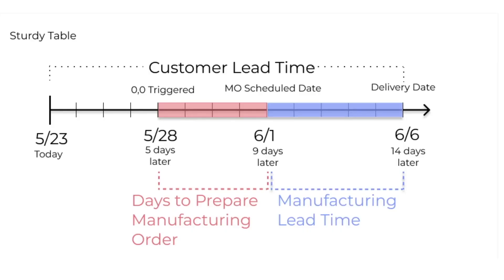So in summary: the 14-day customer lead time is a default timeline for producing a sturdy table. Five days from when we've placed a sales order, we get an alert on the replenishment report to create a manufacturing order. This triggers zero-zero to get our parts from the vendor, which arrives on the ninth day, June 1st. This date is also the scheduled date on the MO — the last day to begin manufacturing the sturdy table to ship it on time, on June 6th.